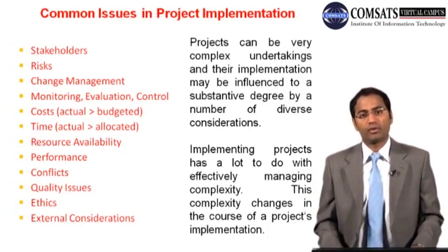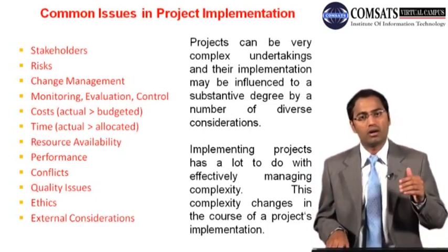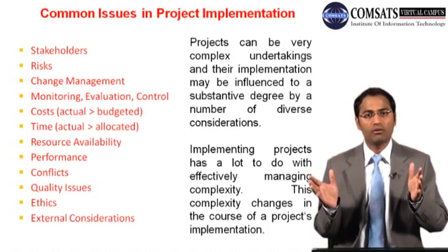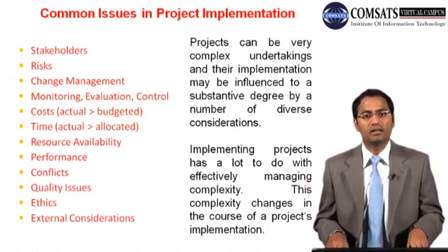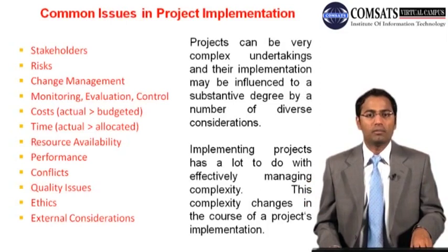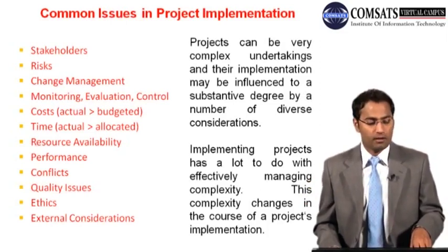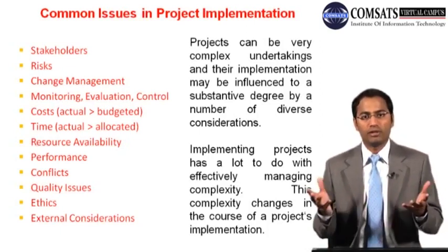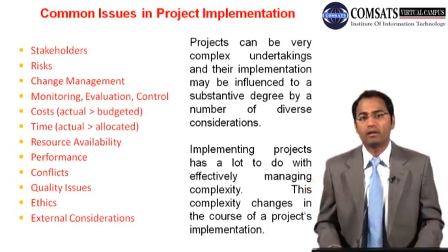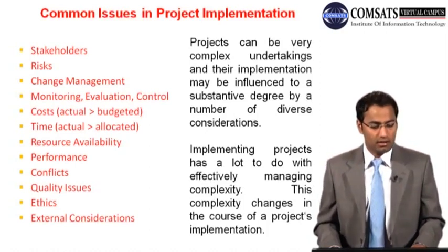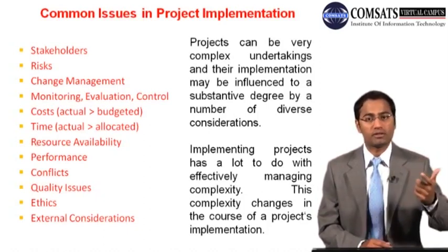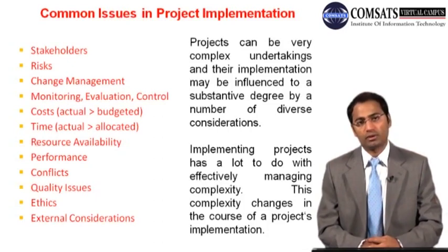And then resource availability. So if you are working on this road project through a rural area, or you are having this project of collecting data, and you have hired even people from nearby villages, and the number is about 200 people. But then there comes the season of crop cutting. Then what will you do? Your project team members will not be available. Usually, in that case, you have to plan for that as well. And then the performance of the project team member, the performance of the processes, the performance of the project as a whole, you are actually taking care of that.